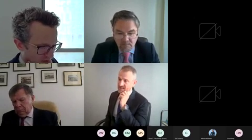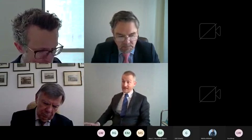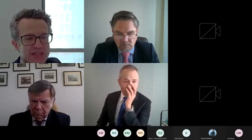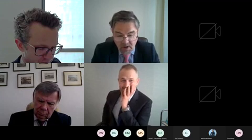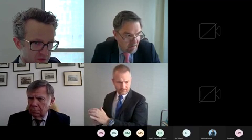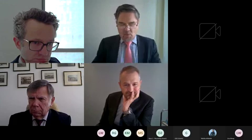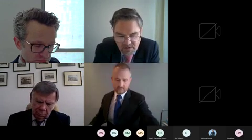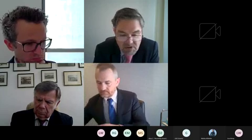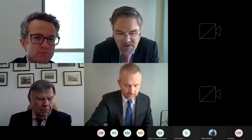Sorry. And then the final thing is this, that you have adopted in your costings a contingency of 5%, haven't you? I have. Would you accept that on the majority of construction projects in Dubai, the contingency which is in fact adopted is more like 10%? I wasn't aware there was a standard. From your experience, would you accept? Well, the way you apply contingency is by understanding how far. Where contingency goes wrong is basically variation, mainly. Clients are varying the original design, and then costs change. So I've made the assumption, you could have no contingency. That'd be very foolish. There isn't a standard for contingency.